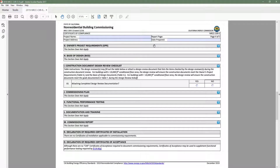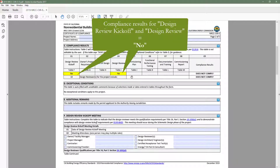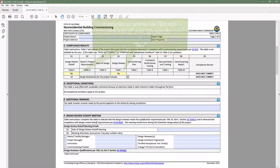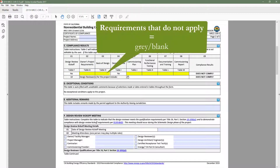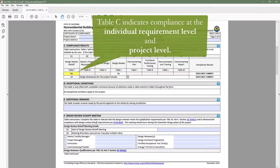You'll also notice that the design review kickoff and design review columns in Table C compliance results indicate no, and all other requirements are required. If we head back to Table A and select less than 10,000 square feet, the owner's project requirements that do not apply as shown in Table B are grayed out. This is another great feature of the dynamic forms: the ability to indicate compliance at the individual requirement level as well as at the project level.